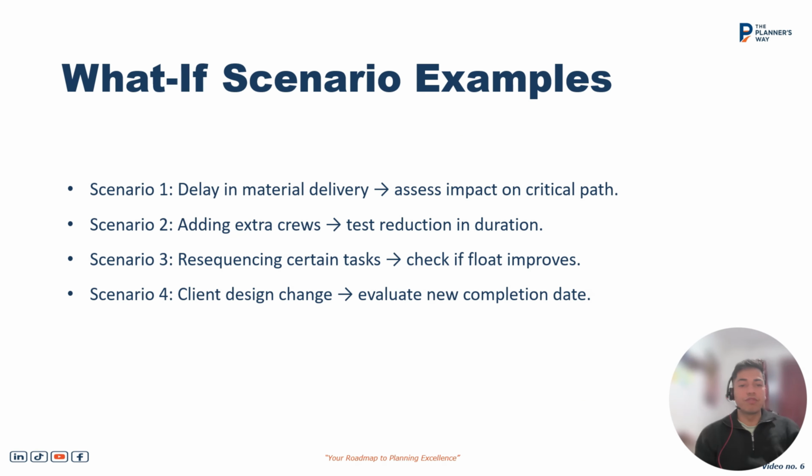We can use what-if scenarios. In any client design changes, we can make the changes on the reflection copy to see the impact on the critical path before merging it to the source directly. So we have the source program saved over there, and we are working only on the copy of the program. If not approved, we can simply delete it.